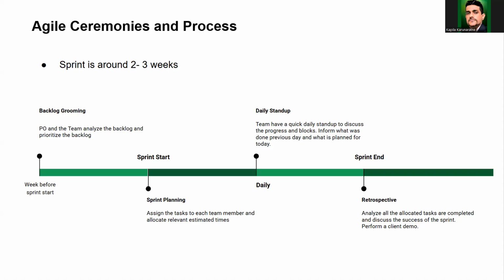This planning activity happens on the very first day, in the sprint planning session. Everybody gets together and makes the plan. That's the very first activity when we start the sprint, right? We have a backlog with a list of user stories, and you are given your first sprint: you have to do the first three user stories. In the planning session you discuss and come to a plan, this is how we are going to do it. Then we will start the work.